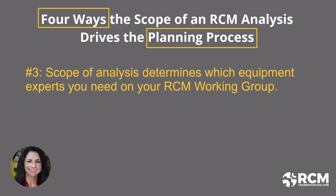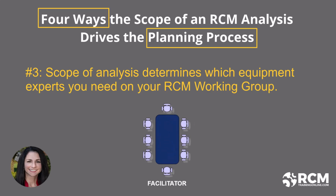The third key consideration is that the scope of analysis determines which equipment experts you need on your team. For our compressor analysis, for example, you might include a maintainer, operator, E&I technician, process engineer, and a reliability manager. Clearly identifying the scope from the outset ensures you know exactly which systems will be analyzed and which experts are necessary. It can be detrimental to the RCM process if you realize mid-analysis that you need additional expertise, like a planner, who wasn't informed or prepared to participate.